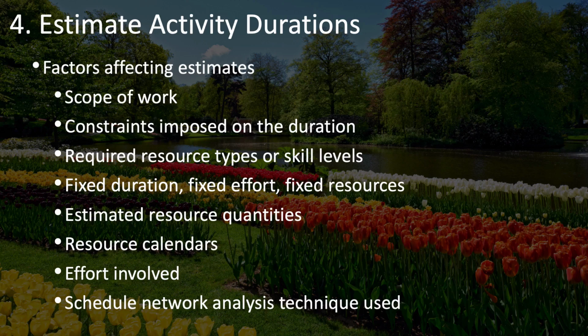More commonly, you'll find that activities depend on the level of effort, and that if you put more people on it, sometimes you can get it done faster. In other cases, you have only a certain number of resources. You may have only one or two of a certain type of resource, and you can't feasibly get more, and so you have to schedule based on those limitations. As you estimate how many resources you have available, that will drive the duration of your activity.